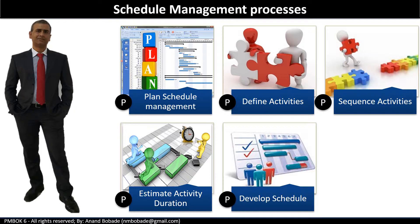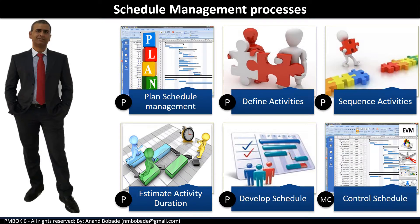And finally, control schedule, which is under the monitoring and controlling process group. So the first five processes are part of the planning process group, and the last process is under monitoring and controlling. Control schedule is the process of monitoring the status of project activities to update the project progress and manage changes to the schedule baseline to achieve the intended plan.